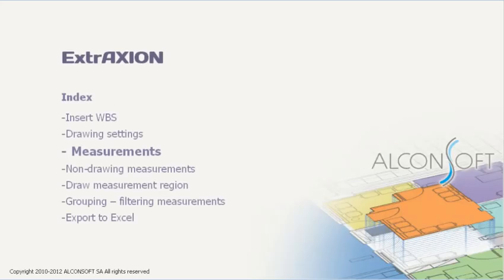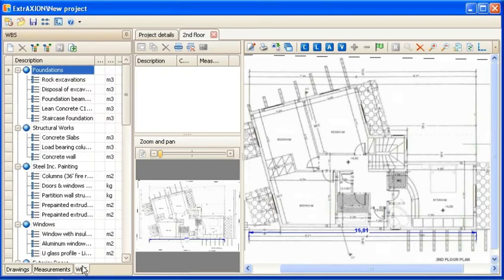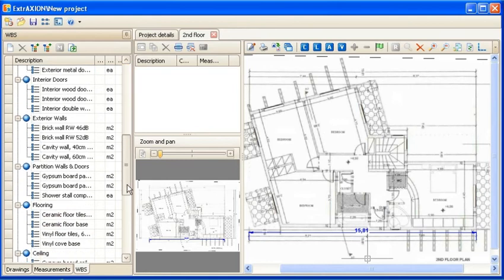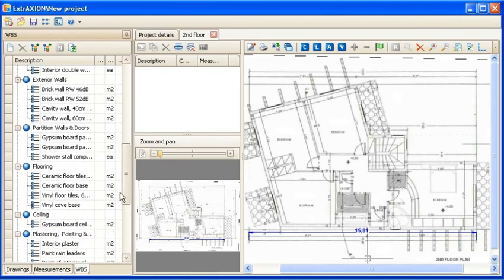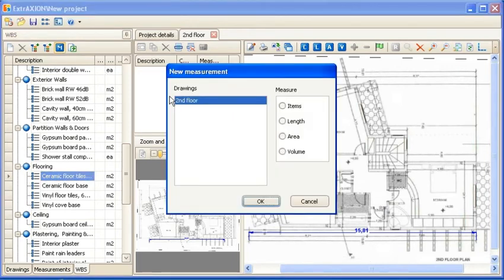On the drawings you can perform complex as well as simple measurements. You can begin a measuring procedure directly from the WBS tab. Select the work item you wish to measure, press the New Measurement button, and select drawing and measurement type.